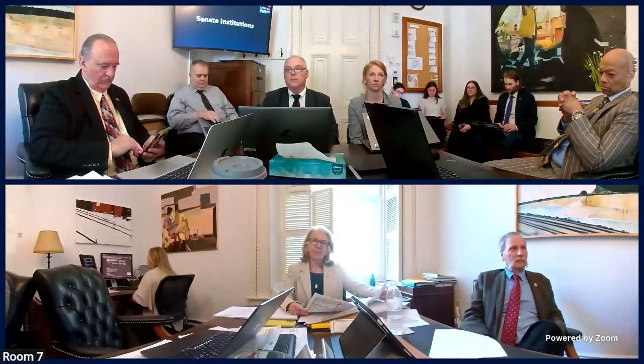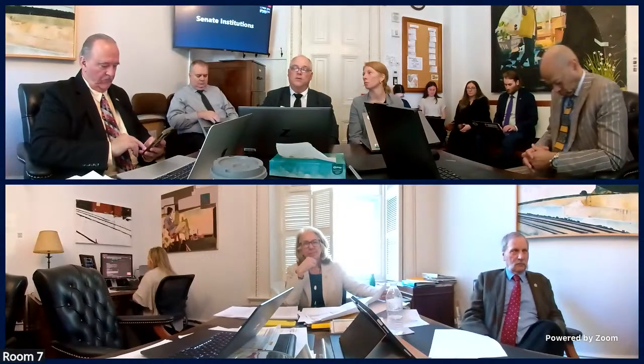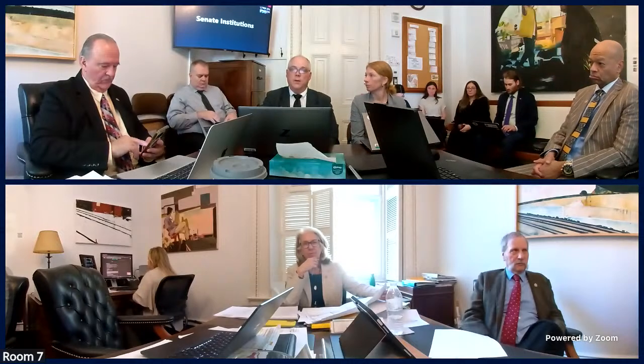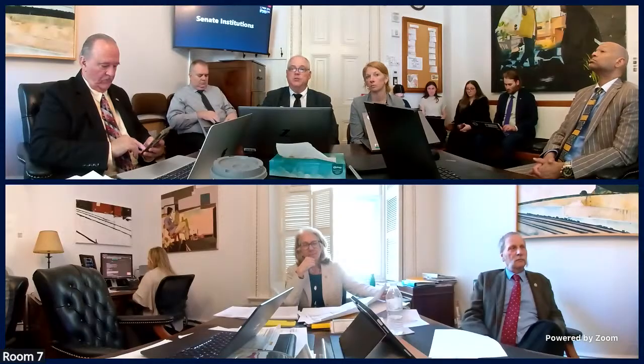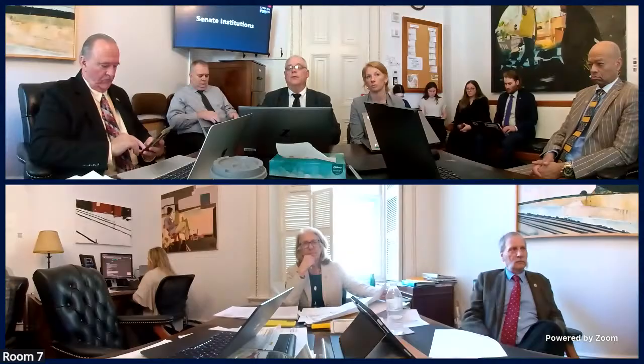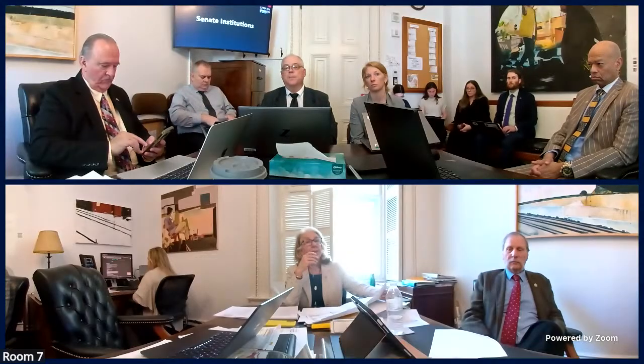And you're going to have contracts in a couple weeks? We have a contract with the construction manager. Correct. Now what happens when the bids come in, we will review the bids. If we have the funding for all of the work, then we will write a change order to incorporate everything that's in what's called the guaranteed maximum price. Oh, okay. And then they start.